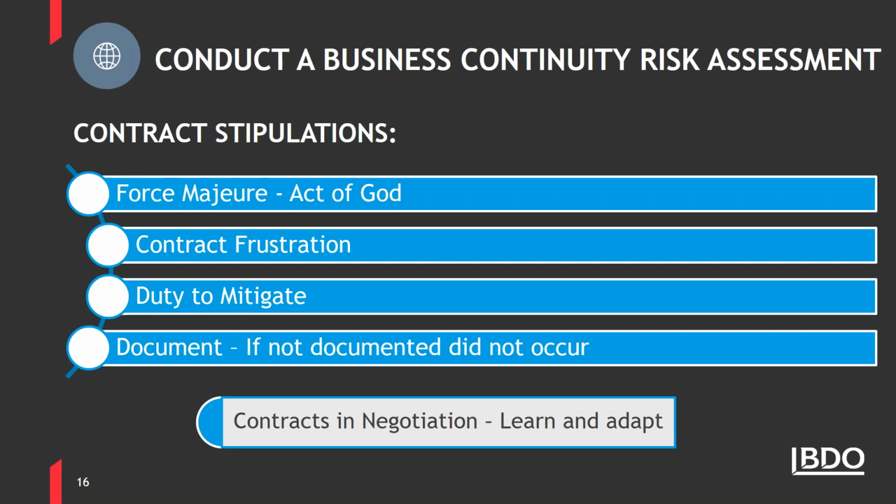So some of the terms that we'll quickly touch upon, one of the major ones in the construction world, is force majeure. Most construction contracts have a force majeure or allowable delay clause of some sort. In the standard CCDC contract documents, these may include government orders and events beyond the contractor's control. COVID-19 could trigger a delay claim under such provisions.